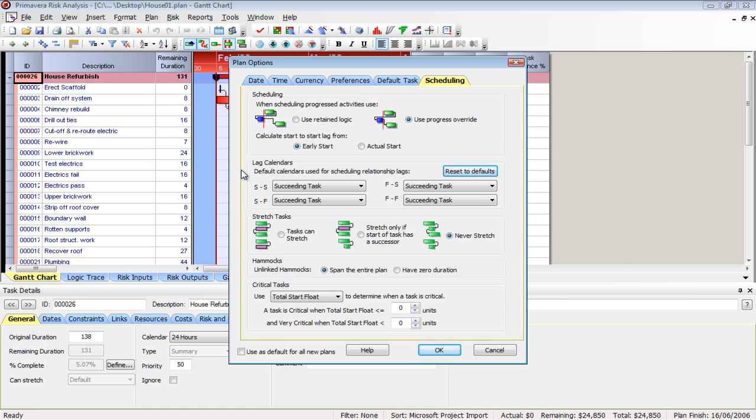That's the reason they have these options in here, because this tool has to mold around every other tool in the industry. So it should take the options directly from your scheduling tool. Not something that you should have to mess with, but it is important to know this, because when you link two activities that have a different calendar, the lag is going to take one of those two activities' calendars. Sometimes the scheduler doesn't realize that either. So it is important to know.